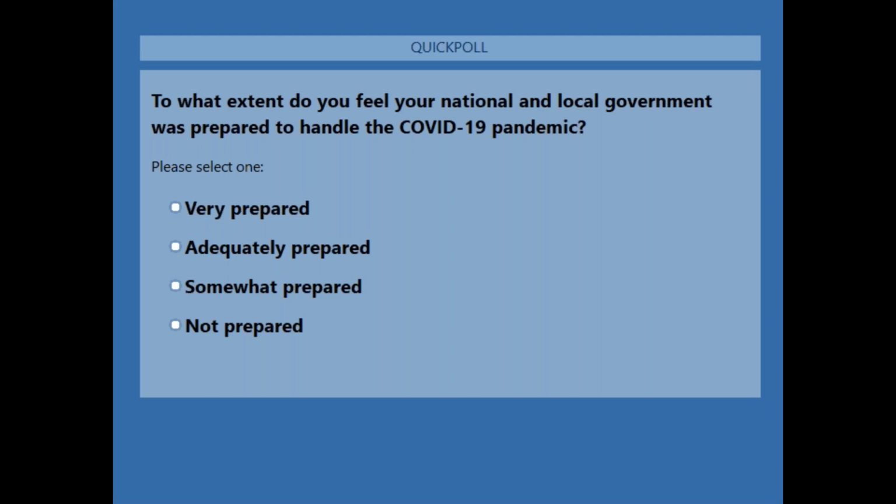So some individual aspects. It's as simple as listing individual risks, and then you put a rating on each risk based on the likelihood and impact. Then you look at what current controls we have in place and where we are vulnerable. What are our strengths and weaknesses for managing risk? Then put together a plan of action to treat those risks. This is about as simple as we can make it.